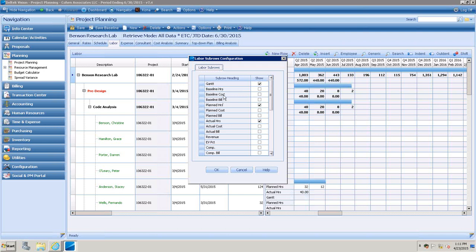If you'd like to hide cost rates, very easy to do within the configuration, so this does not become an option. We can see our planned and baseline, exactly the same on day one, but the moment we hit a bump in the road or it rains or something happens, the planned and the baseline change. Project managers are actively working with the planned hours to make those changes. You can see here down below, actual hours, cost, or bill coming over from our accounting system. We can then see our revenue and forecast that once again, time period by time period. We can see some of our earned value percentages or our compensations here as well, all included within the system.